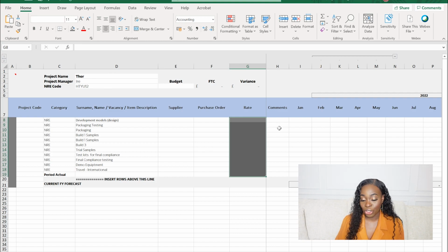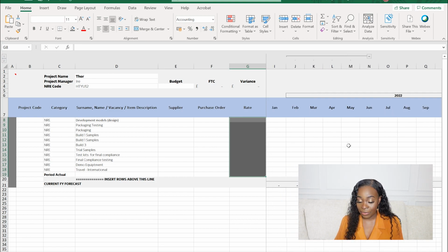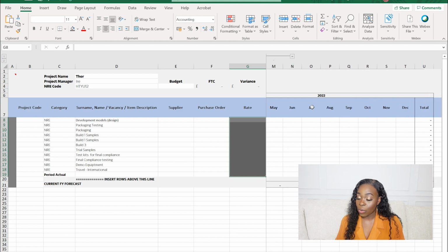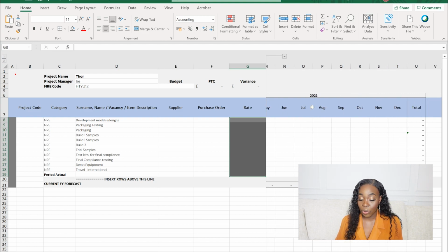and comments as usual. So the same kind of scenario here then. I'm just at the top also just put in January through to December, so I know the costs that are going to be pulled in here. Very similar kind of process of how to get costs for your NRE budget. You look at your project plan. Your project plan has all the information you need to create your budget.